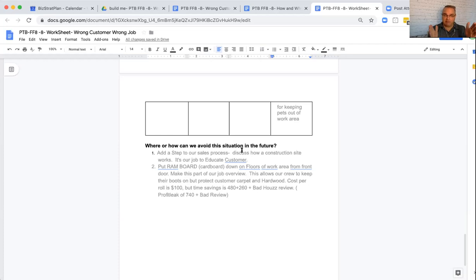In there, on that flow chart, it says homeowners to vacate the property during this phase of installation or demolition or whatever it is. It's there, it's written in black and white. It must be true. I need you out of the property so we can take out the hot water tank, so we can remove the countertop, whatever it is. It's there, right? So this is the solution that came from talking to the good people on your team around the table. That's it right there. It's our job to educate the customer.